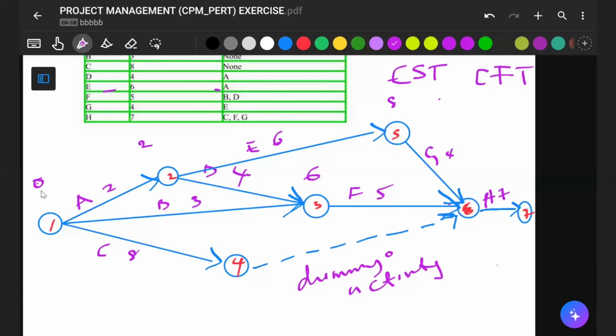Here, this 0 you are seeing up, plus 3 equals 3. 3 is less than 6, so we pick 6, and then we move on. So we discard this one now. We'll just keep making our movement.